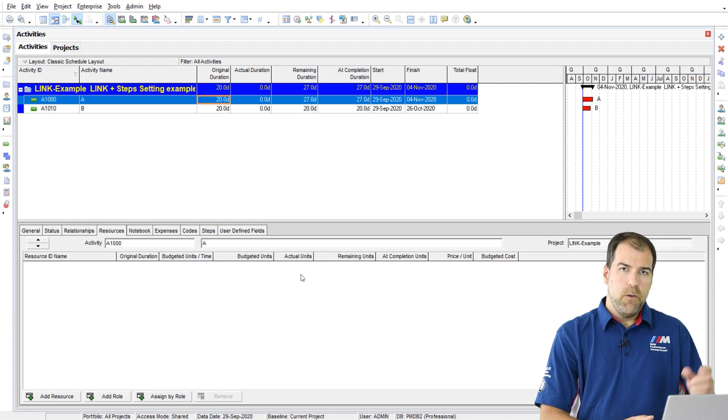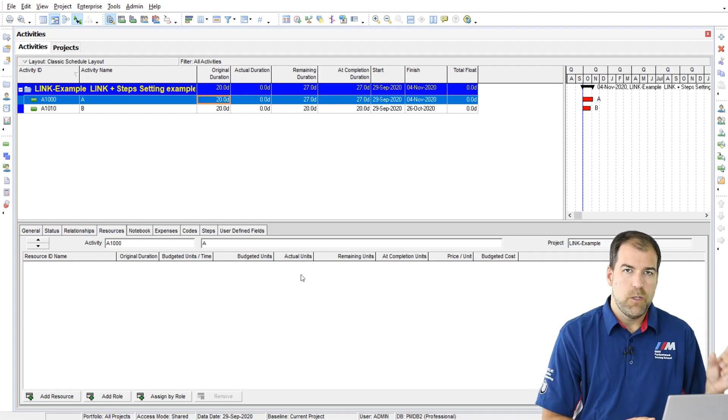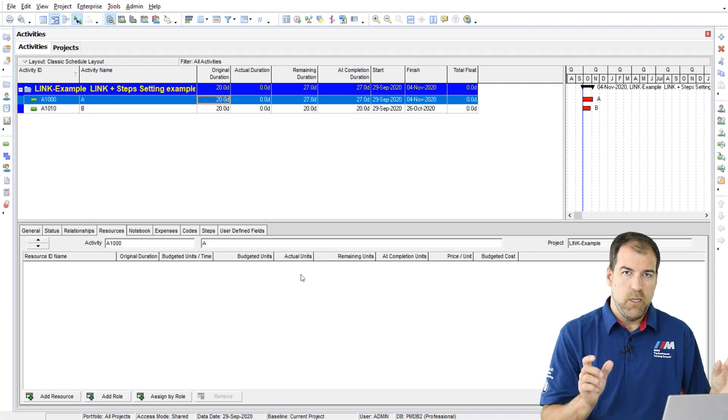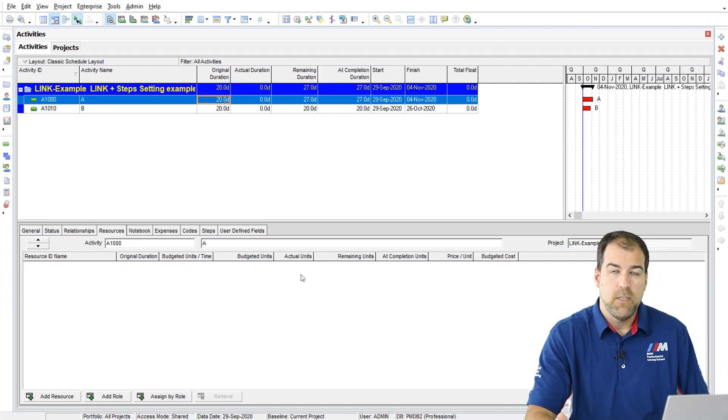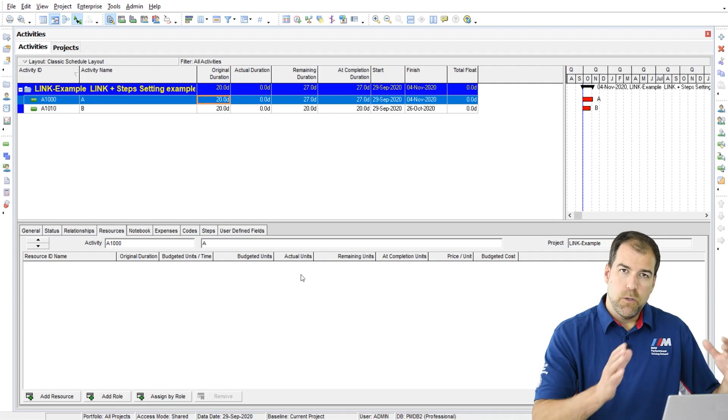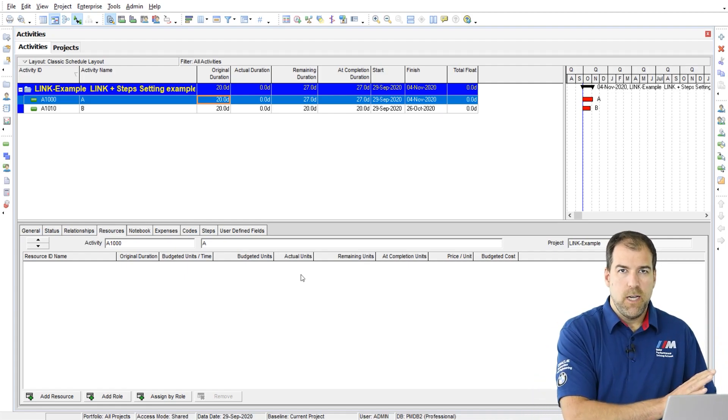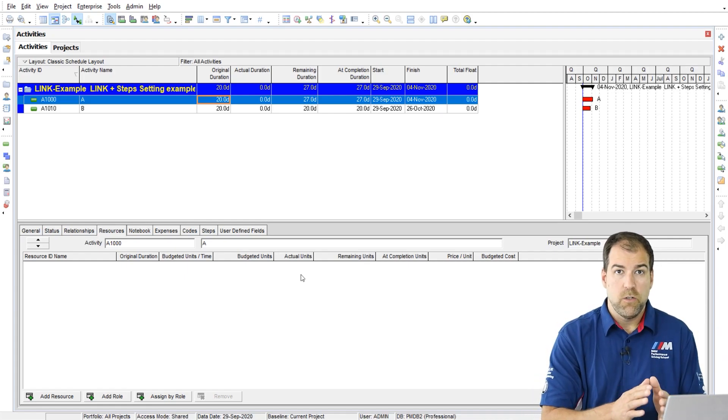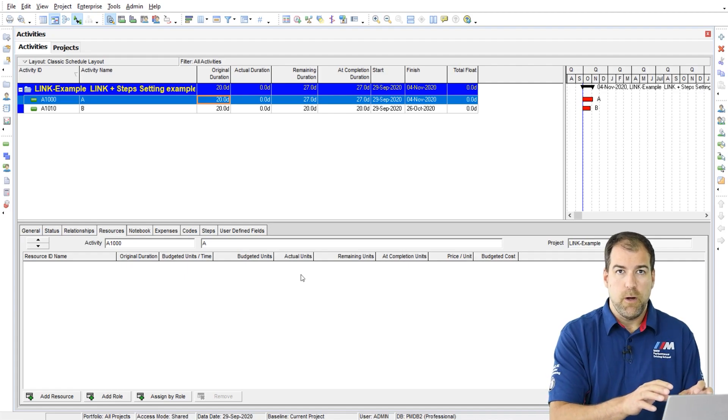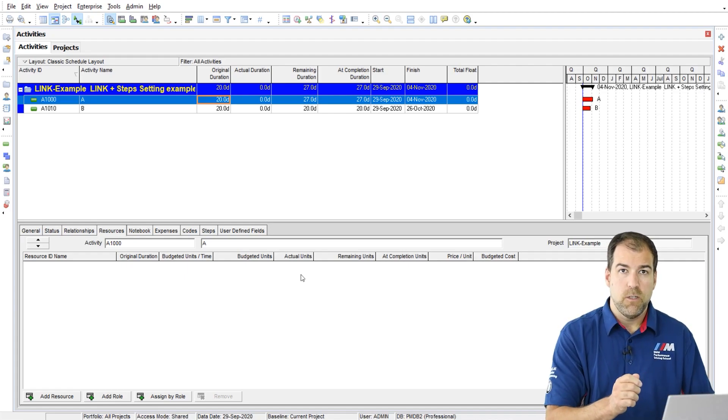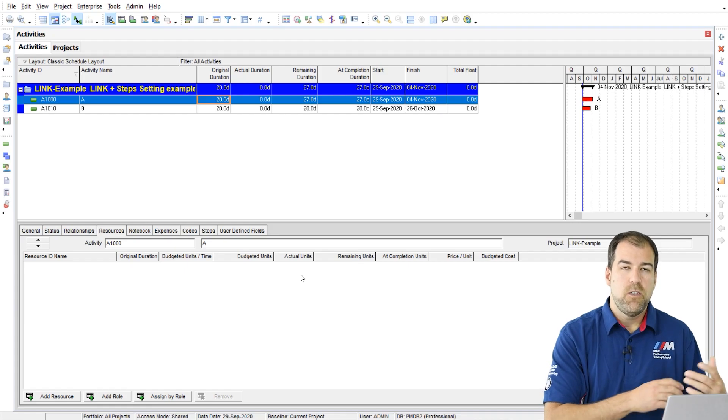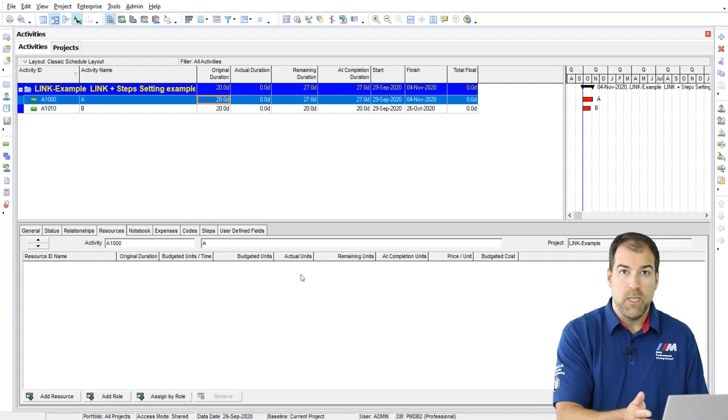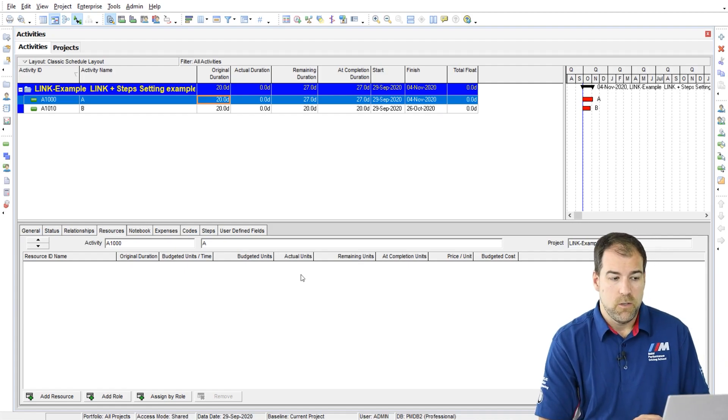If you want to preserve your original estimates and make changes, you should be using a real baseline in P6 to do that. Preserve your original estimates in the baseline and update the original duration of your current project and do the comparison to see that there was a change. Don't do it without baselining. That's my recommendation to you.